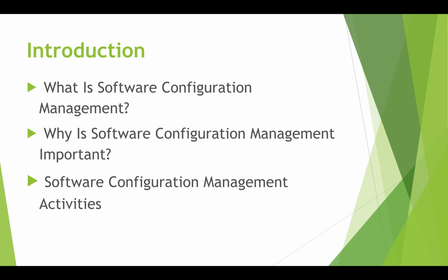First of all is identifying the configuration management roles, like the configuration manager, configuration change control board, developer or change implementer, etc. The second activity is to identify the configuration items, which could be the source code, test code, or documents like the SDG, etc. Then the next one is change management, which includes the handling, approval, and tracking of all the change requests raised.